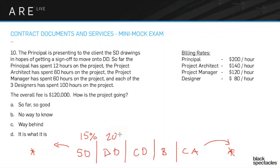Generally, the phase percentage breakdowns are: SD is about 15%, DD about 20%, CDs about 45%, bidding about 5%, and CA about 15%. These numbers aren't always exact, and with BIM and building information technologies, they're starting to shift. But right now, this is still how contracts are structured and how the exam thinks about it.